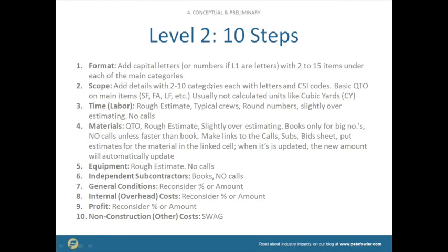So instead of $100,000 for the windows, you've got, okay, it's going to cost me $40,000 to get these things installed, and the material itself, the windows, is going to cost me 70 grand. And then I've got flashing materials, and I've got nails and screws, and I've got all of the equipment that I'm required to do this.